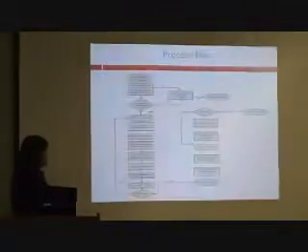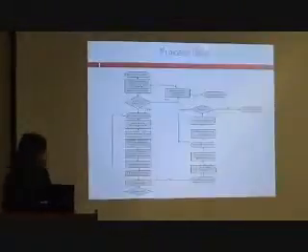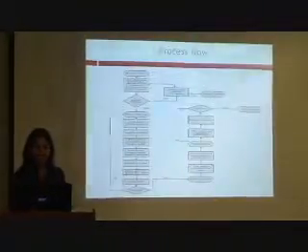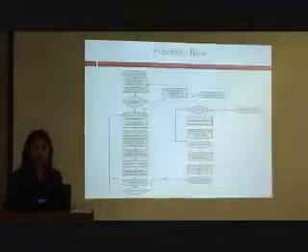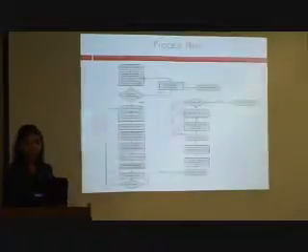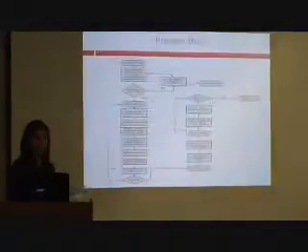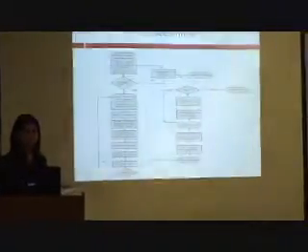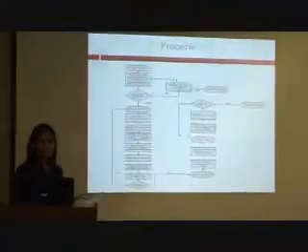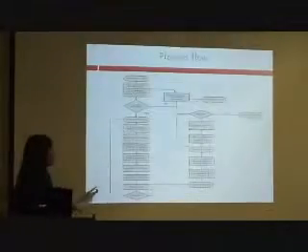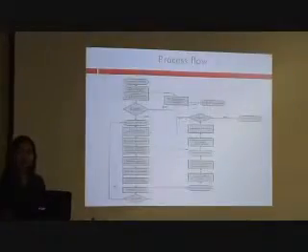In the project execution phase, the first step is to do the final project presentation, which is currently in progress. This is our forum to communicate our project status to our stakeholders. And then at the end of that communication will be the project closing phase. Then we will verify the acceptance of our project deliverable with Dr. Rod, and also have a lessons learned feedback session towards the end, and then a sign off before we head into project closure.